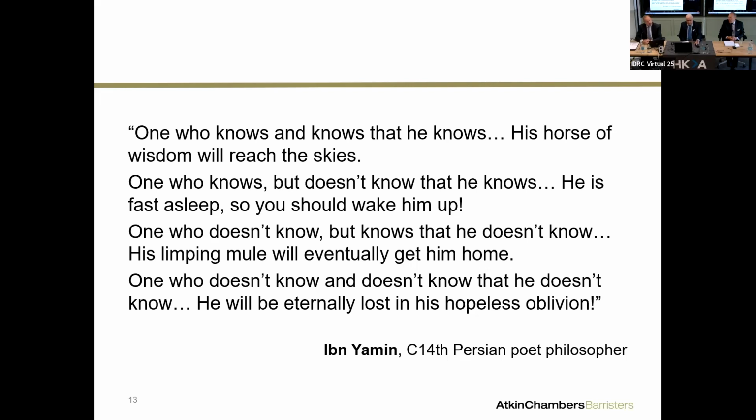From a disputes lawyer's perspective, and I appreciate this is possibly not the most commercial observation, if what you're looking to do from the employer's perspective is to try and achieve some level of comfort that in the future you've got some recourse, some thought might be given to the possibility, for example, like in the FIDIC conditions you see, for tests after completion. And what we often focus upon is the performance tests on completion to show completion, the takeover moment.